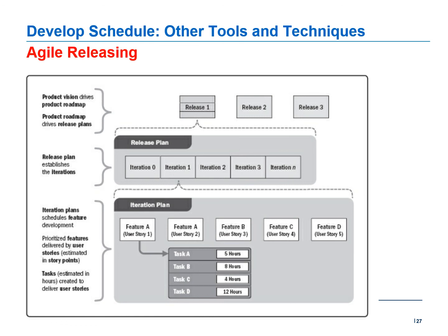And now how you could do the estimation and complete the scheduling is that you look at each and every task and estimate these activities. Generally, agile teams do not rely on hourly or daily basis estimations. They use a technique called relative estimations. That is just to get a sense how much work that can be done within an iteration.